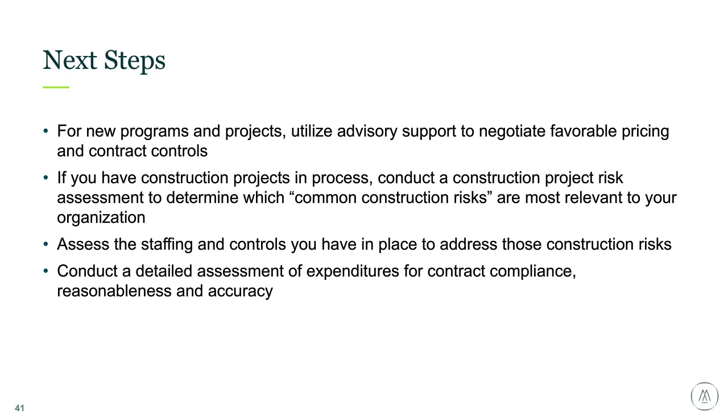It's not rocket science. You go to the contract terms. Every project can have very unique contract terms, so go to the contract, ask for the detail, and see how it's compliant with the contract terms. Every cost should match up with the cost of work section. So it's a fun and easy exercise. You may need 3 cups of coffee, but anyone can do it.